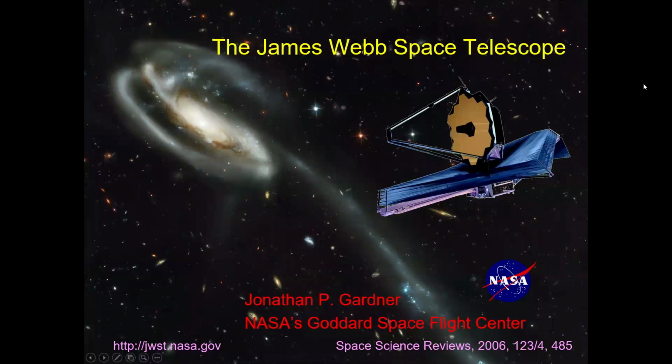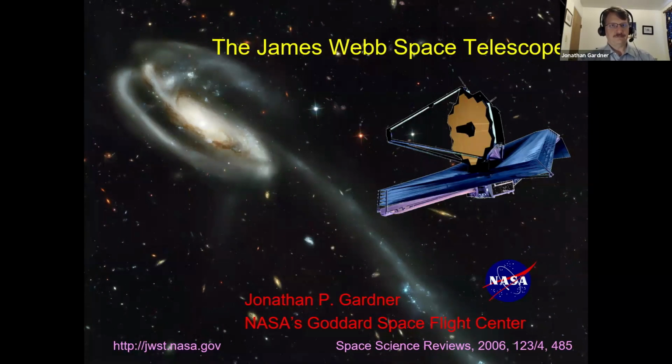All right, we have a question from Piron. Is there a specific preparation when the JWST will arrive to French Guiana, and will it be mounted in the rocket? Right, so we will be shipping the observatory from Los Angeles to French Guiana by boat through the Panama Canal, and it arrives about 3 months before the launch. There is a number of preparations that will be done at the launch site to install the payload into the rocket fairing, get the rocket and the rocket fairing ready to go, and that's a process that is scheduled to take about 3 months.